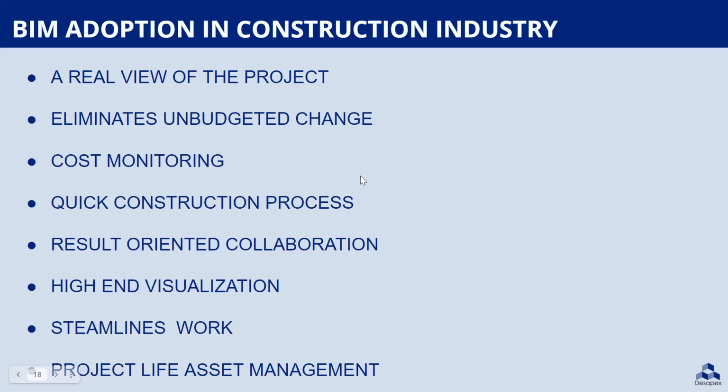So the virtual model provides a potential view of the construction progress. Comparing the actual site as built with the BIM model projected at that point in time provides a transparent data point for identifying the deviations. So this means that there are no last-minute changes made to the design during the construction period. And BIM also helps in controlling the construction costs due to unforeseen changes in the actual design.